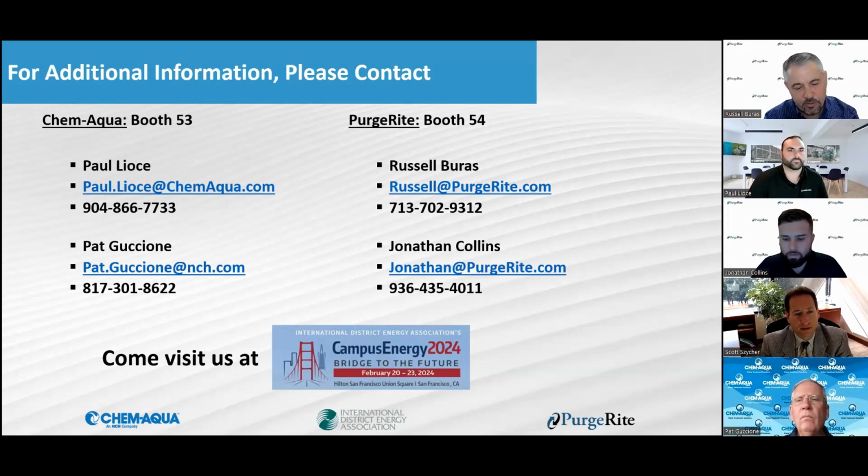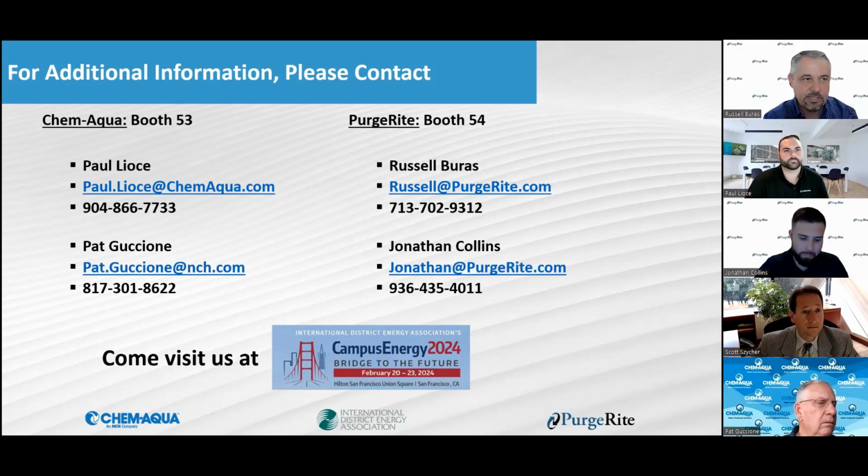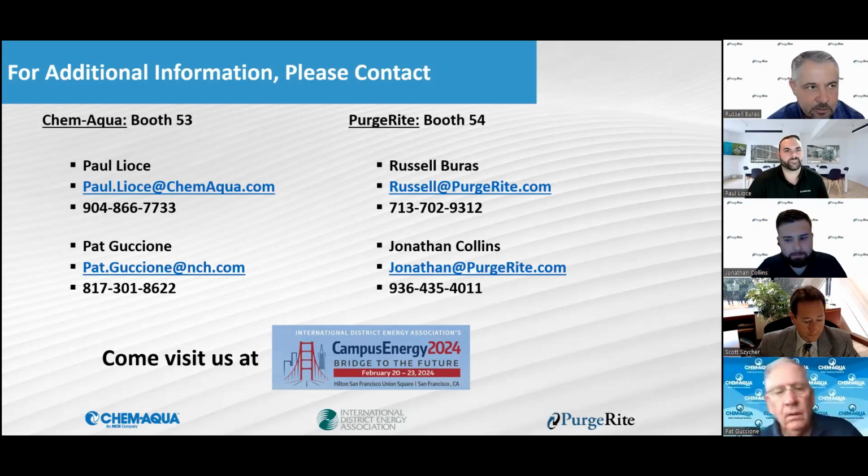Yeah, that's a great question. Typically, we are a subcontractor to the mechanical. It's usually the mechanical's job to install a new system and to assure that it's hydrostatically tested and cleaned for commissioning. The other part of that, when we put a proposal together, the key things that we look for are the specifications, typically the mechanical division 23.